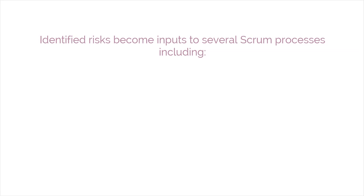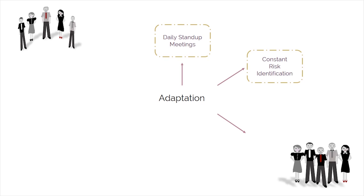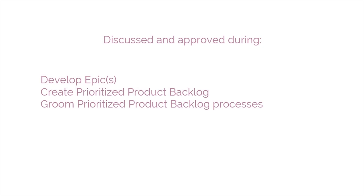Risk identification is performed and iterated throughout the project. Identified risks become inputs to several Scrum processes, including Create Prioritized Product Backlog, Groom Prioritized Product Backlog, and Create Sprint Backlog. Improvements can also result in Change Requests, which are discussed and approved during the Develop Epics, Create Prioritized Product Backlog, and Groom Prioritized Product Backlog processes.